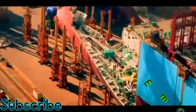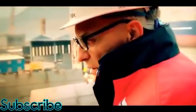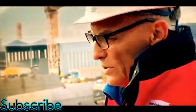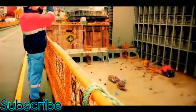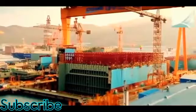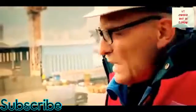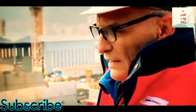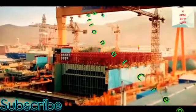A process called semi-launching. So that's the refloating, the semi-launching. Get the semi-launch right, and the team can complete the build. Get it wrong, and the Triple E could sink before she's finished. We would put ballast in the forward end of the tanks, so we have an even floating out, an even keel. The success of the semi-launch hinges on a novel invention built into the dry dock itself.